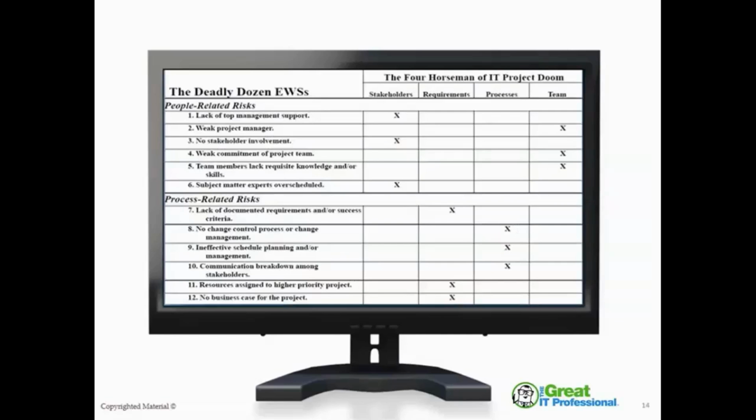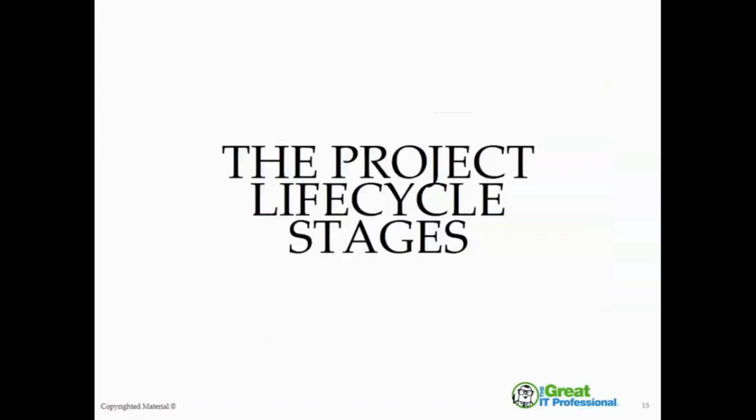Now, here's another study that we participated in with another university, and again, you can see that of the people-related risks, lack of top management support came out as the number one reason for projects failing to meet their business objectives.